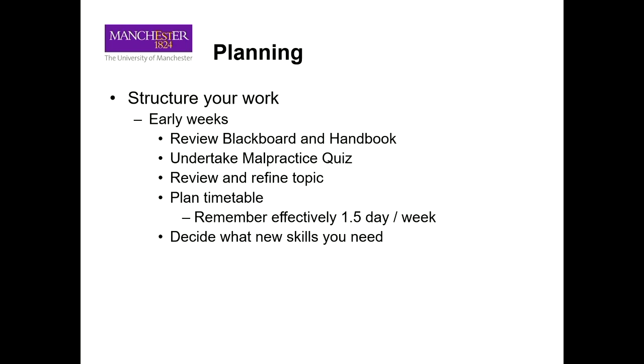Yes, so anything like learning software, it takes time. Being able to access labs, you need to learn how to use the machine, okay? You need to write the risk assessment. This takes time. So make sure in your planning that you allow for that time. If your project is on using an ECM machine or a laser machine, you can't just turn up to the lab and start using the machine. You need to allow time to write the risk assessment, get the training, planning your work. Okay, so build that into your plan.